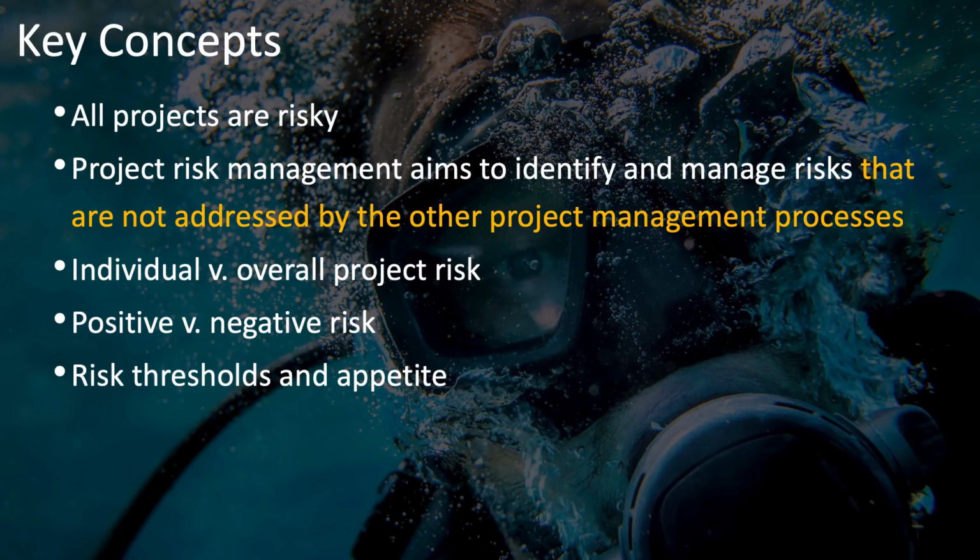The reason that there are other knowledge areas is because the management of risks in these other areas has matured to the point that there are standard best practices for them. Because projects are at risk for scope not being well understood or increasing out of control, we have standard processes, tools, and techniques and artifacts such as brainstorming, focus groups, requirements traceability matrices, work breakdown structures, and the scope baseline, as well as many others, to manage these risks, along with change and configuration management.